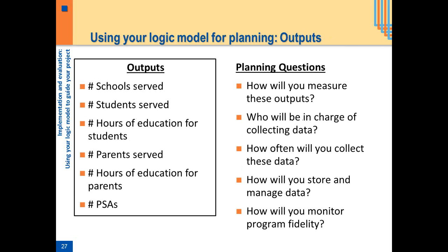The logic model also provides opportunities to document during planning the outputs you want to achieve. For example, the number of schools that you want to serve, the number of youths you plan to serve, how many hours each youth is going to receive your project activities, the number of media messages or other activities you're going to deliver. And as your team agrees on the outputs that will be in your logic model, it's also a good idea to start discussing how you're going to document these outputs or assess when they are actually occurring.